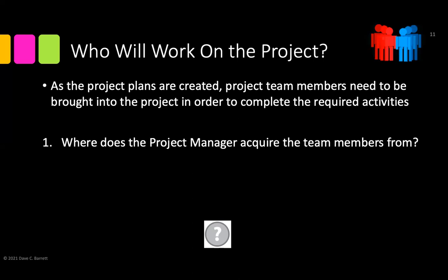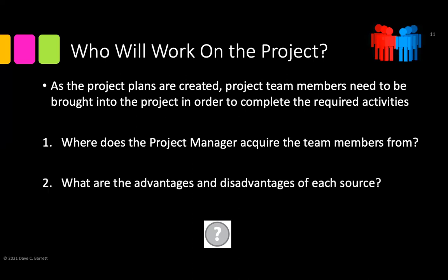Right? Now, you know there are multiple ways you can acquire team members. Now what are the advantages and disadvantages of each source? If you're going to hire your team members using your company's HR manager, the process is typically slow, because the HR manager will take some approvals and then float your requirement to various job portals, and slowly they will check those profiles to see if the profile is matching or not.